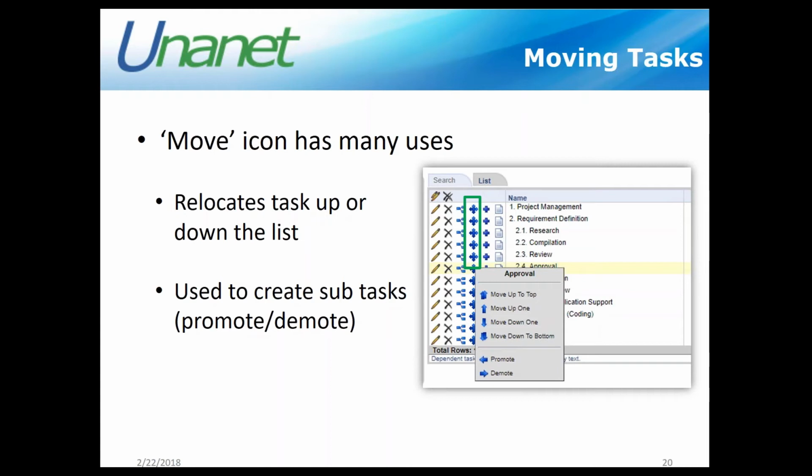But the part I want to share with you is how do you create subtasks? And so this promote and demote option down here at the bottom is how we would create this area here for 2.1 research. I made that a subtask by demoting it and putting it underneath my requirement definition. So that is the way that we create subtasks within the database.